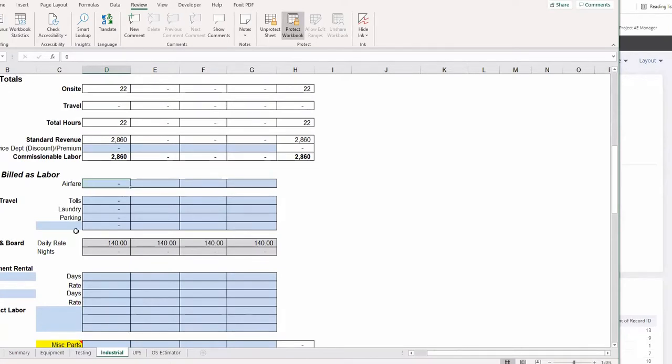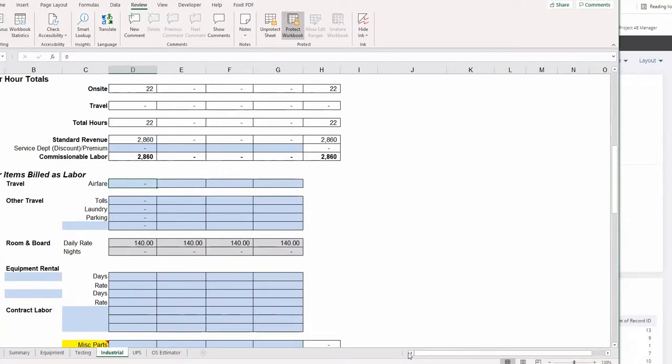If we come to a point where we need to add these in, I'll help you guys individually to do this, but I'll go over them really quickly. If we're having to fly somewhere, you guys obviously know at this point we have Dry Creek, but when we didn't have Dry Creek and we were going to California to do work, we were having to fly there. DOT will not let our guys drive more than 12 hours. So instead of driving 12 hours and sleeping in the truck at a truck stop overnight, we fly our guys there and we ship the equipment we need.